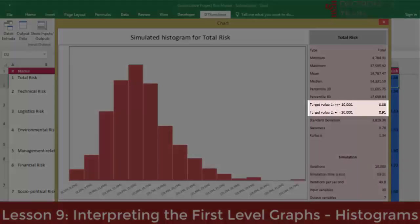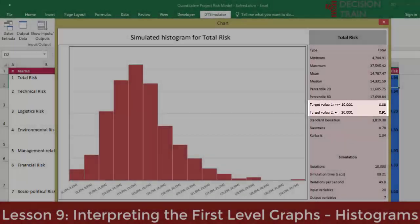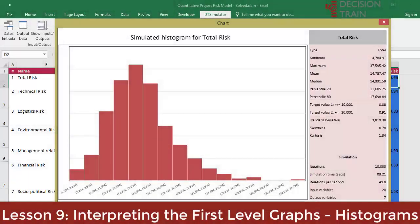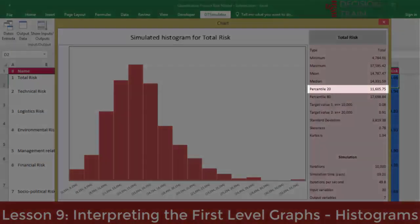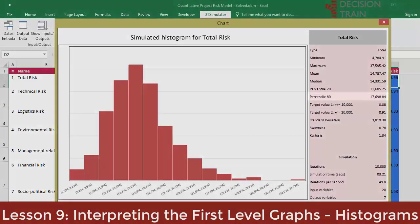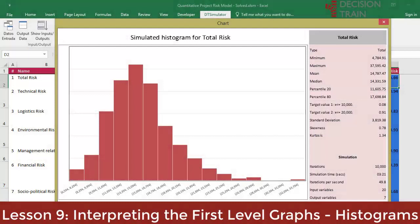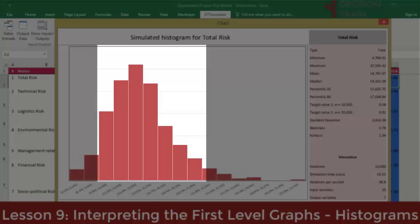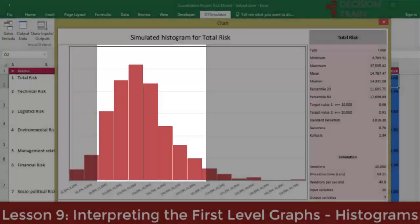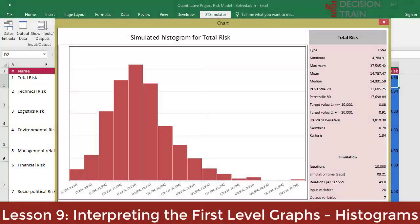The two target values have been arbitrarily set at $10,000 and $20,000. These four statistics can be modified in parameters. The 20th percentile is approximately $11,600, and the 80th percentile is approximately $17,700. This means that there is a 20% probability that the results will be less than $11,600, and there is also a 20% probability that the results are greater than $17,700. Towards the center, there is a concentration of 60% probability that the results are between these values. We can then calculate the probabilistic contingencies.